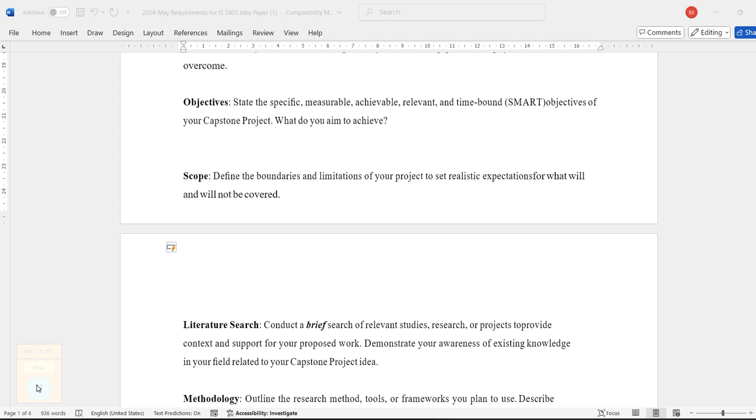You should say that the application we are going to create will be limited to appointment management, which includes collecting patient details, reviewing doctor time availability, and the number of patients he can serve in a day. Based on that, we can fix all the things. So only these functions: checking doctor availability, checking the date, checking the patient details, and allocating an appointment.